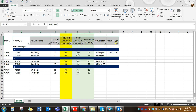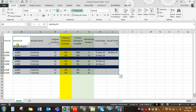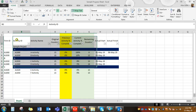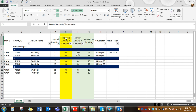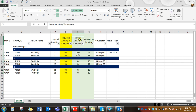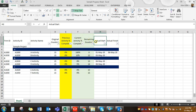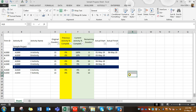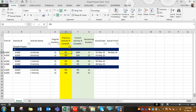I have prepared one Excel sheet — I have copied the data from Primavera as-is into Excel, and I have added some columns. For example, the activity percent complete. We need to update these percentages, so I have inserted another column called 'current activity percent complete,' then the remaining duration, actual start, and actual finish. I just renamed the start and finish columns and made them blank.